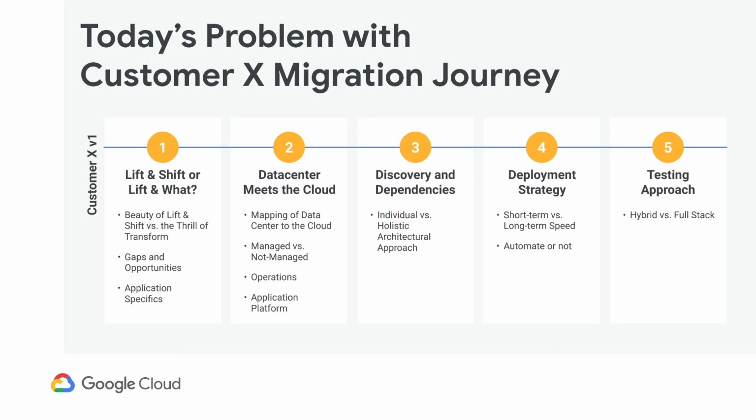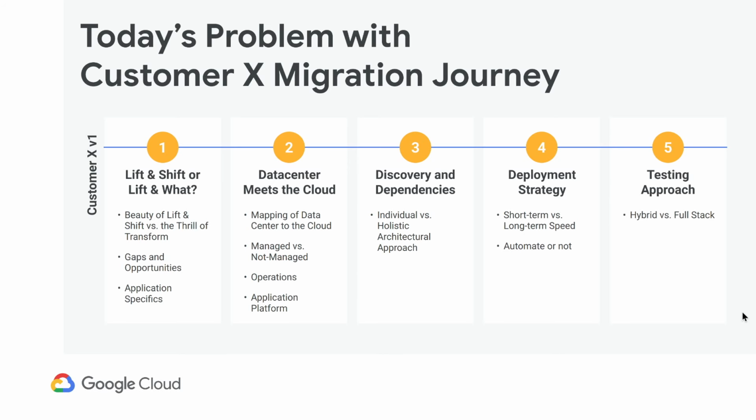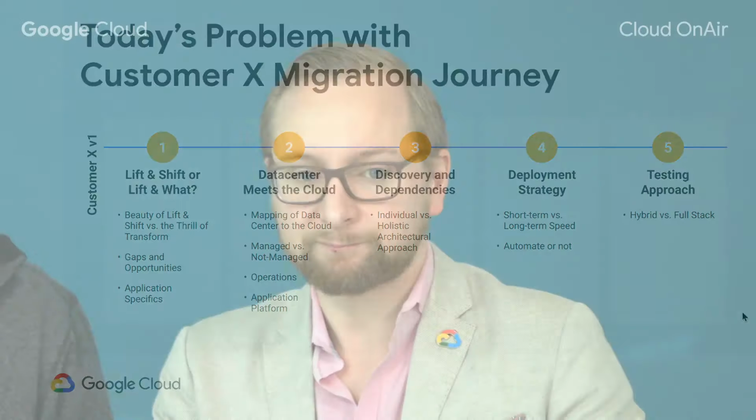A lot of the time, our customers who want to get out of their data center, which is common, want to think about it as going rack by rack. I'm going to start with rack A and go right through rack Z, and move each of those racks to GCP. We found there's a way which is a little bit more powerful, which is to instead break it down by services and by applications. We'll talk in a moment about how we've changed this journey for the future.